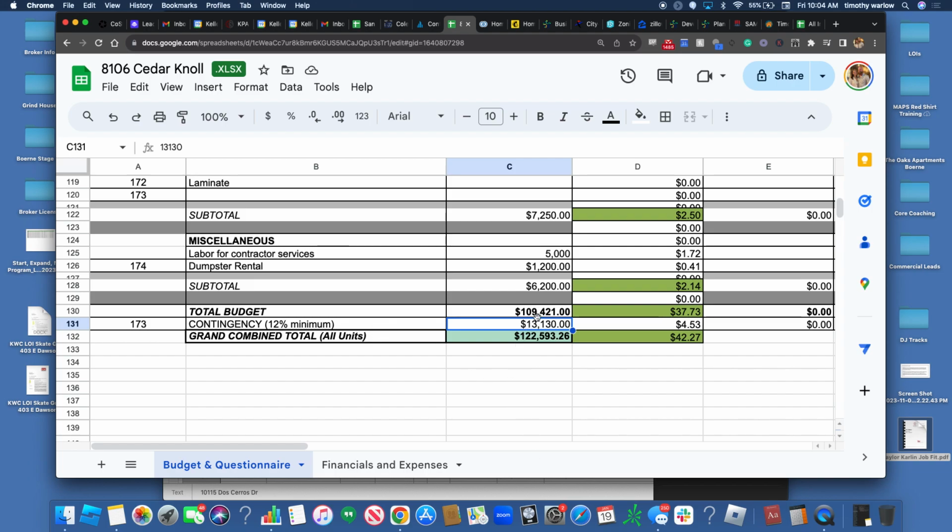Well, and the inspector on this project was so strict that when I submitted for reimbursements, let's say I submitted the full kitchen reimbursement, he literally came back with notes saying hardware on site but not installed will not reimburse. We're talking literally, unless the work is done, they are not giving you the money for it.